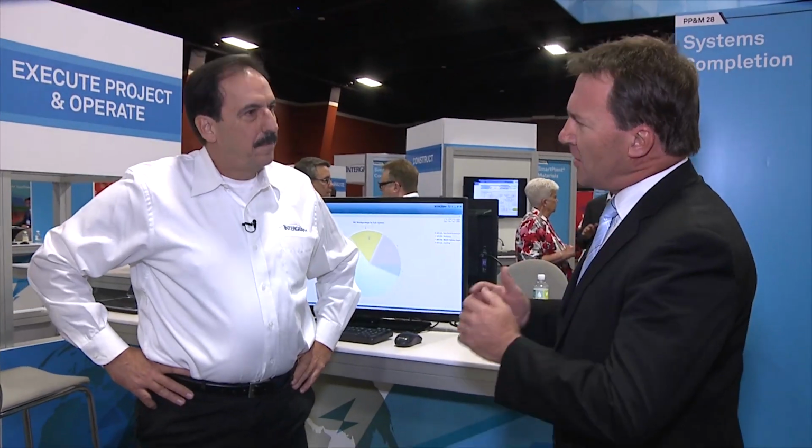Okay, well, I'm over here now with Mike Montgomery. Mike, we're going to talk about systems completions. Can you just give me a bit of a background on what is systems completions? Okay, systems completion is the process of going from construction into operations. So it includes things like mechanical completions, pre-commissioning, handover, and startup.